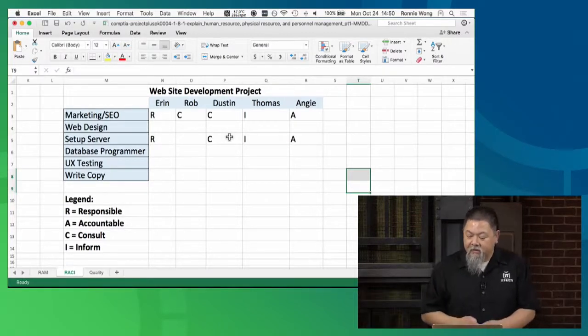Okay? All right, so what does that lead us to then? Well, as much as we'd love to say that every resource, whether shared or dedicated, is going to be available 100% of the time, the other thing that we also have to deal with in terms of resources is what we call resource shortage. When it comes down to the realm of resource shortages, it happens more often by far with shared resources. And that's because if they are only working on one other project, they're probably busy with that other project. If they're working on more than one project, they're probably divided in their focus anyways.